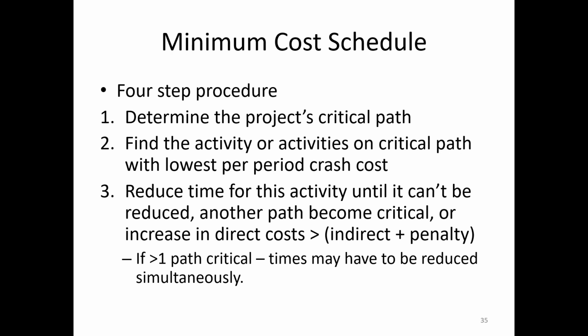Or we reach the point where it's just not worth our while. The cost of crashing is higher than our benefits. At that point, we go, no thanks. No point in us crashing any further because it's not in our interests. Our costs of crashing outweigh the benefits of that crashing. At that point, we say stop.